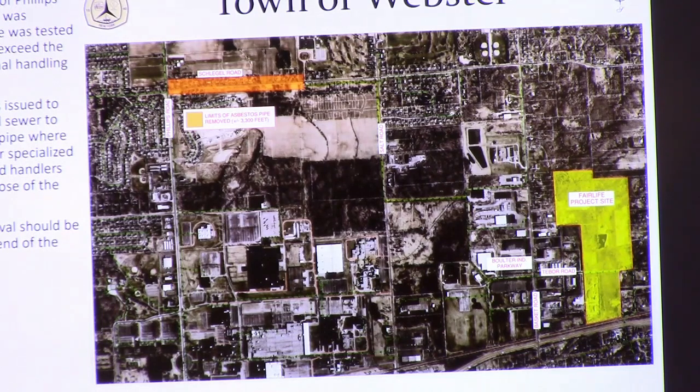This area where we're in, it was very narrow easements to begin with, only 15 foot wide easements, and there's water main and utility poles that were all in the way. So it was decided to remove the asbestos pipe, and it's our opinion that if it were put out to bid this way, likely would have incurred higher costs than if it were handled this way. If it were open bid, a contractor would have put higher prices on it. Actually, the contractor was very willing to work with us.